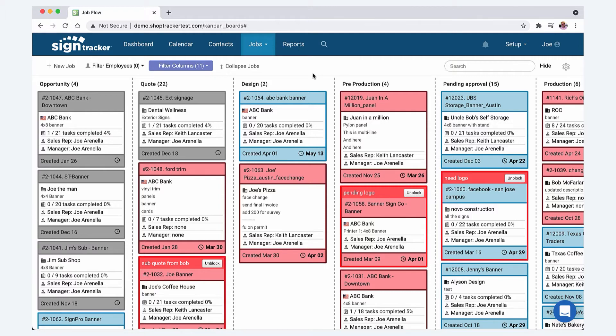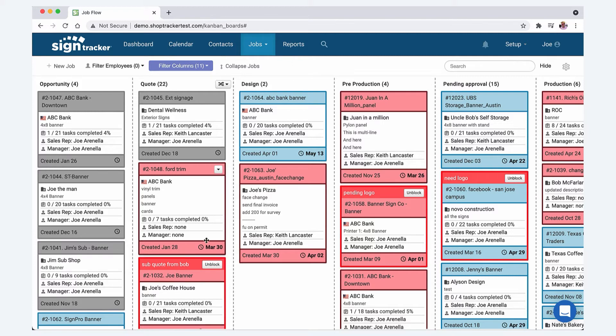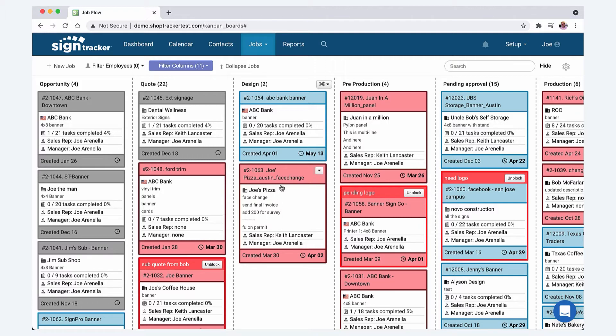We would literally go through every single job card. What's holding it up? Why didn't we get this logo? Why do we need to, what are we, why are we still waiting on material quotes or whatever? We would pretty much go through every job card to make sure that everything was moving along the way it was supposed to be. Then we'd have our second production meeting on Thursdays in the morning. That would just be more of a standup meeting, just make sure nothing was getting clogged up.